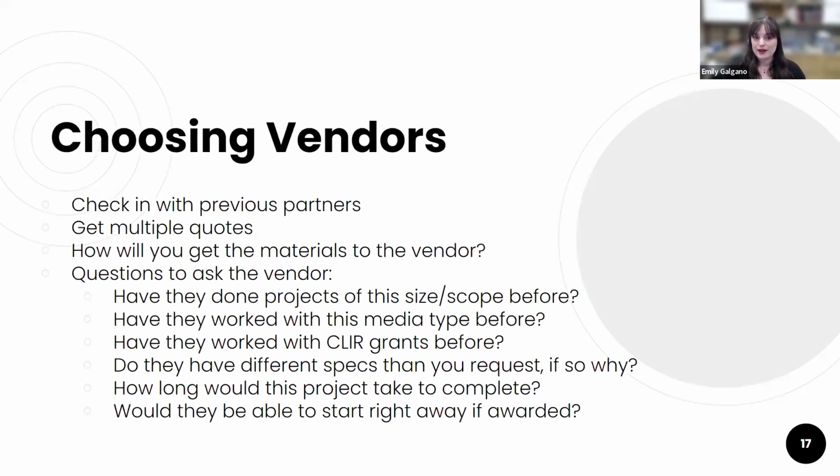But depending on your formats, you may actually have to go to another vendor because not all vendors work with all media types. Some specialize in audio, some specialize in photographs. It's all different equipment, so there may be different vendors that have different specialties that will work better for your collection. You also want to think about where the vendor is. I live up in Alaska, and so that's a big question of how we are going to get our materials to the chosen vendor. Even when we work with a partner located here in Alaska, I live in Juneau, which is only accessible by plane or boat. So if their vendor is located in Anchorage, I still have to coordinate shipping logistics to get all of those materials onto a plane to Anchorage. Another vendor we work with is in Kentucky, which is an even bigger challenge to get materials to.